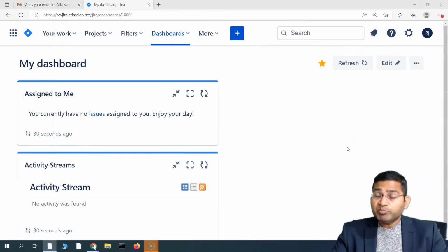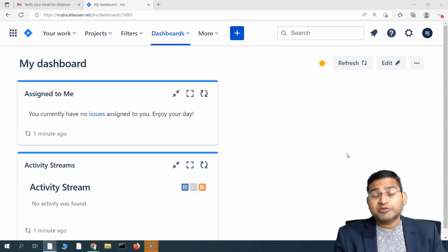So an epic is a big piece of work that can span multiple sprints, and as I explained previously, a sprint is the time-boxed iteration. It could be a 2 to 4 week cycle. If the work item cannot fit, the epic will be the big piece of work that spans multiple sprints. For example, if I talk about the registration functionality, or capturing the lead